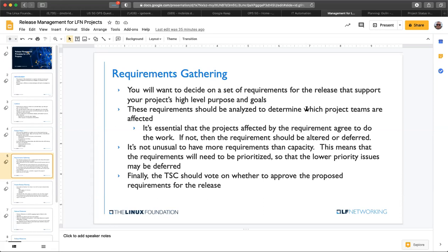And going back to ONAP again, that's a thing that frequently sinks some requirement proposals. Someone will say, we should do such and such, and several of the projects involved say, no, I'm overwhelmed here, I've got too much to do already, we can't take that on. And so the requirement ends up being deferred, or reduced in scope, so that it can accommodate the development capacity you have. So getting alignment between your aspirations in terms of requirements and where the rubber meets the road with execution is really critical. Otherwise, your requirements list is just a fantasy.